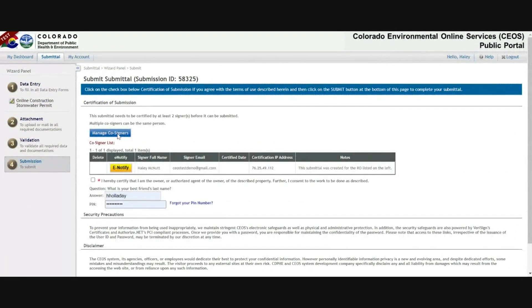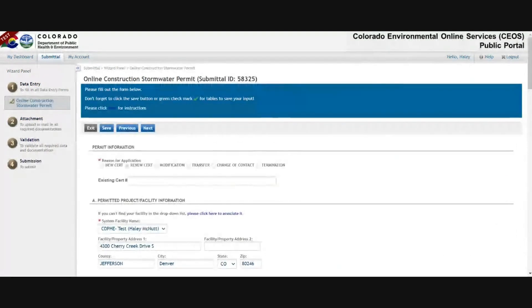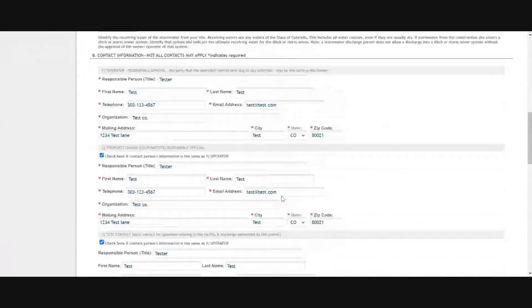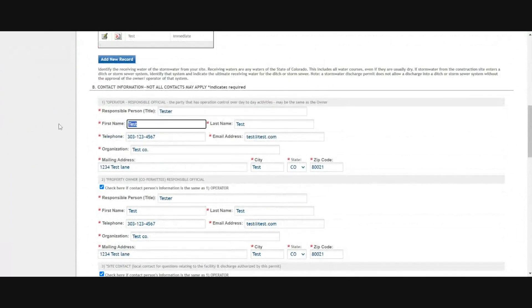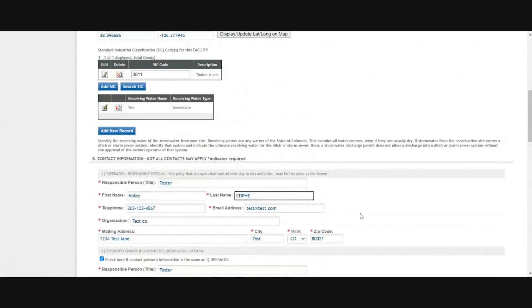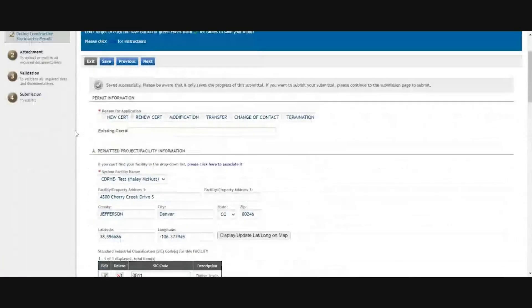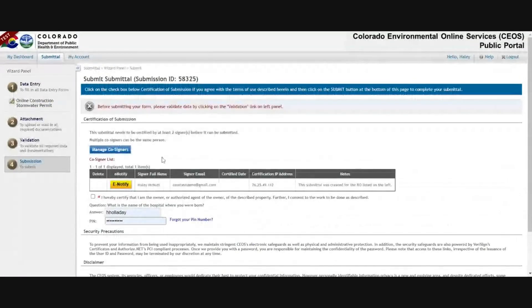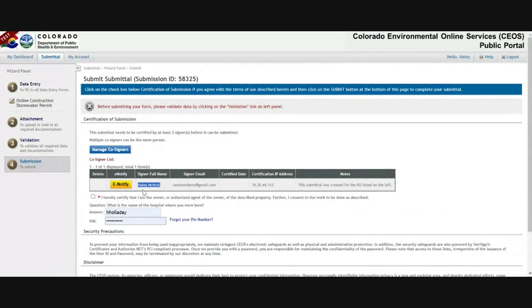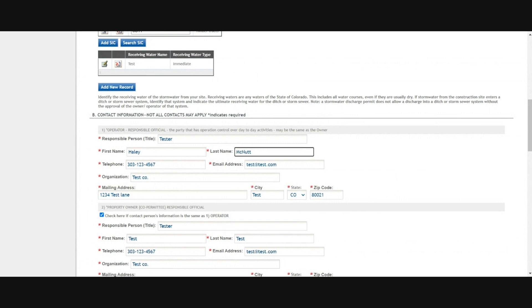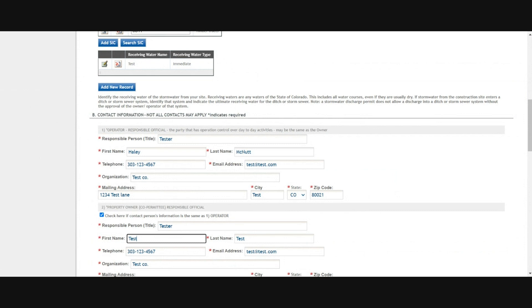To submit, you'll need a signature from the owner and the operator that you've listed on the application. In this case, I'm going to go back to the form on the left-hand side under data entry. Check what name you had for the owner and the operator and make sure to update them so that they match exactly the names that will be signing the application. In this case, the signature is going to come through as Haley McNutt. We need it to be Haley McNutt, not Haley CDPHE. In your case, it'll be whoever is the operator of the site and whoever is the owner of the site going forward. Sometimes these are different people and sometimes they're the same.